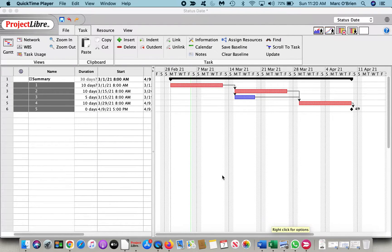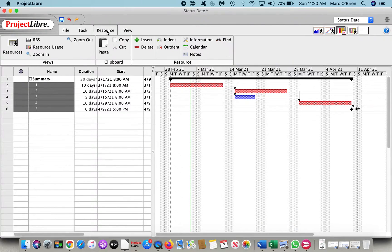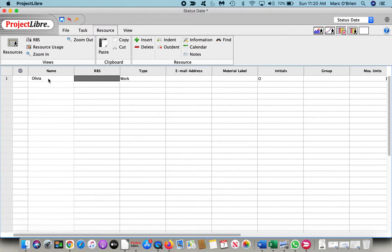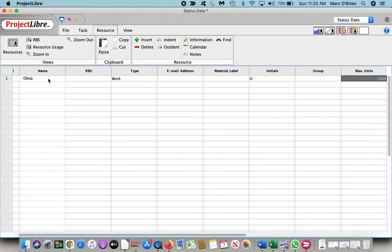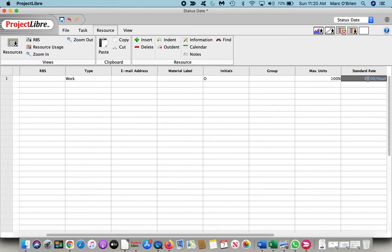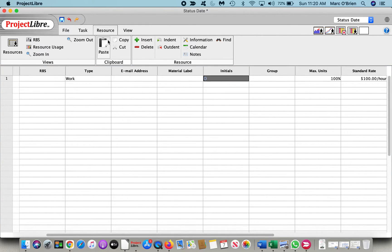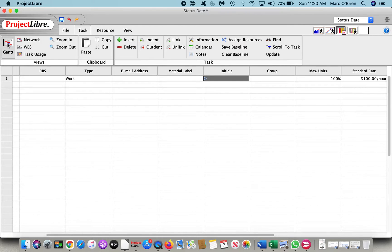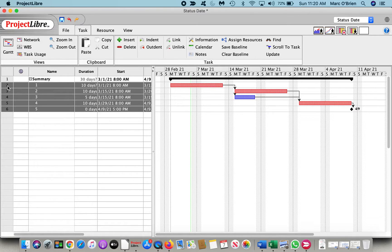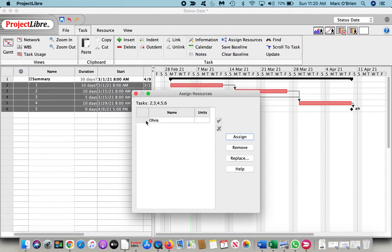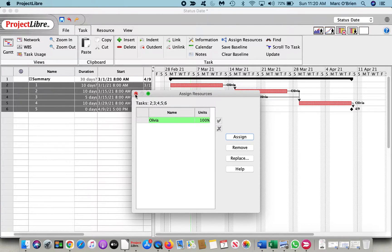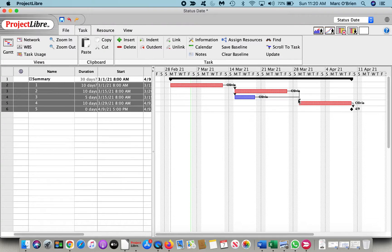We are going to be tracking both schedule and cost, so let me enter a resource and assign the resource to a set of tasks. I will enter Olivia, scroll over, and give her a rate of $100 an hour, a bargain for Olivia. Go back over to task and the Gantt chart, and I will assign Olivia to these tasks. I can say assign resource, Olivia, assign, and you can see that on the Gantt chart, Olivia is now assigned to all of these tasks.